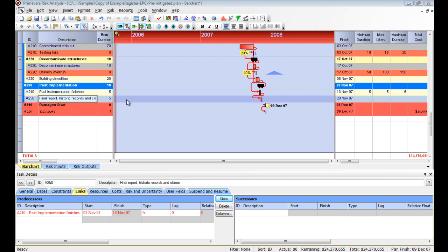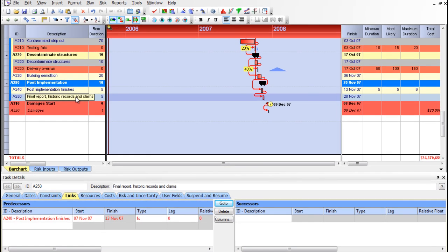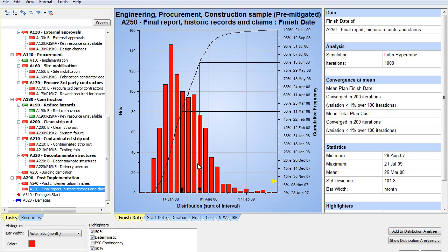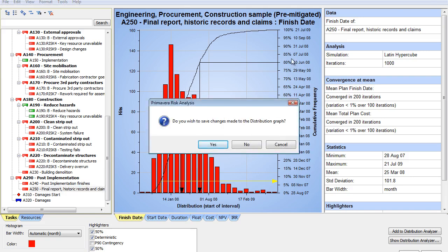So your histogram chart is always telling you where you're at. What's my chance of success? They want to be 80% confident. Well, I need 206 days. You can't have 206 days. Well, I need to figure out how to fix it. So what we're going to do is look at our tornado chart. So once again, histogram chart, where am I at? I'm very late. I'm gone from November all the way out months into June.